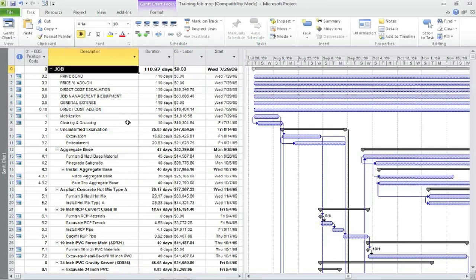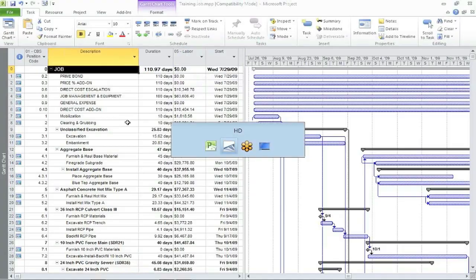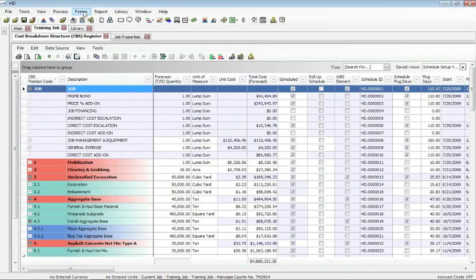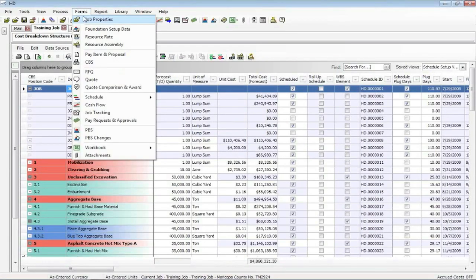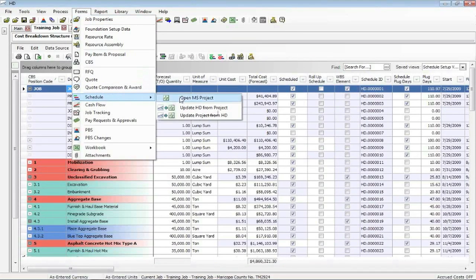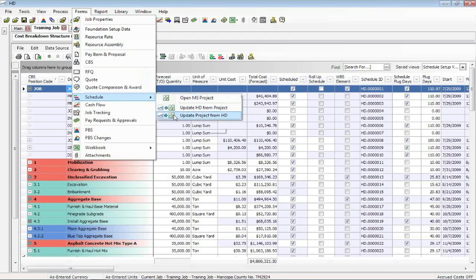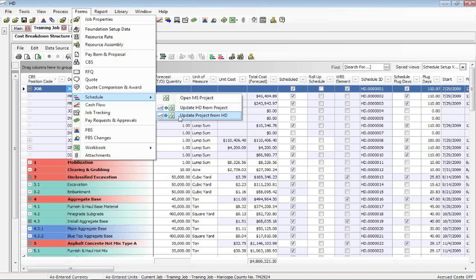I'm going to go back into hard dollars just for a moment. And on the forms command, this is where I first said open up MS project. If I'd made some change back on that job properties form on the schedule tab between, you know, roll up and whatnot. And if I want to send out the costs, the labor costs, equipment costs, that's what update project will do. Update hard dollar from project will bring the dates back. That's what that does.